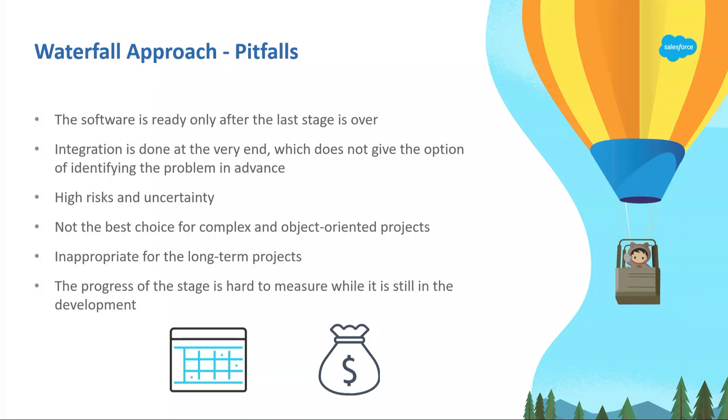Now, the last point here mentions that it's difficult to measure the progress of the development project while it's in flight. The reason for this is that most of the requirements in the waterfall approach are highly dependent on one another and may rely on a common framework to be developed first before the development velocity really starts to pick up. So if the project manager is basing the schedule on solution design items getting completed, there will probably be a skew in the completion status of the overall development project.